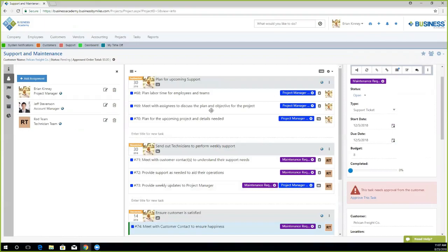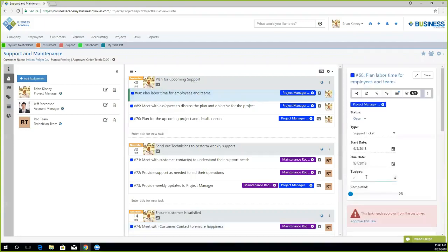Now, please note that apart from all of our milestone budgets, we also have a complete project budget up here. So we can see that we have 168 hours scheduled for our project. Now we can always add or subtract budgets within each task as we go. So if we realize that we actually need more than 8 hours, we can put 12, and that'll automatically save as we're changing.